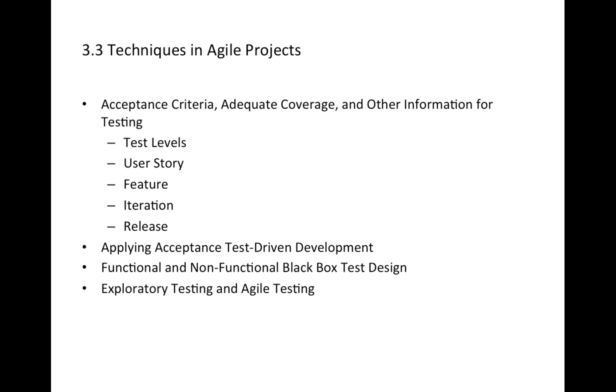The next one is the feature. The definition of done for a feature, which may span multiple user stories or an epic, could be: the design is complete with no technical debt, the code is complete with no technical debt, no major defects remain to be corrected, and feature documentation is complete, which may include release notes, user manuals, and online help functions, and so on.